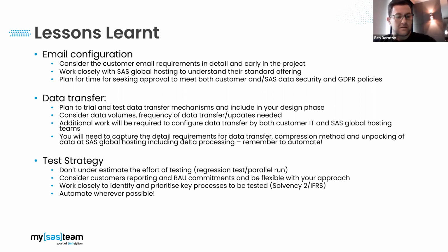And finally, the testing strategy. The only point I'd say here is not to underestimate the effort required for testing. When working with an insurance company, often your customer has their own priorities and BAU activity that they need to perform, and you need to consider the impacts of testing upon that activity, and the availability of the key SMEs, especially with their priority processes such as Solvency II or IFRS.